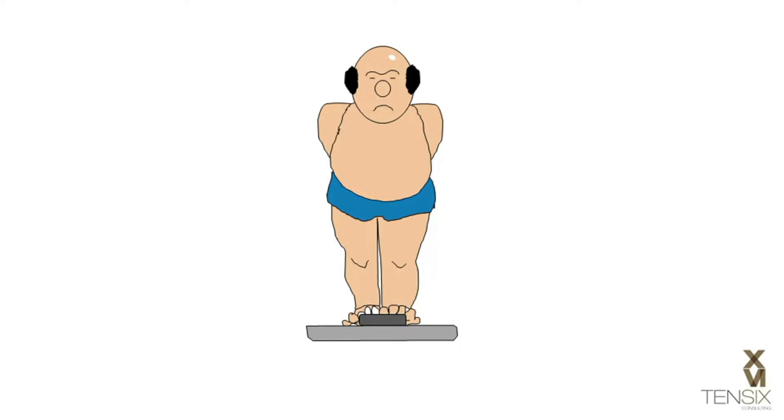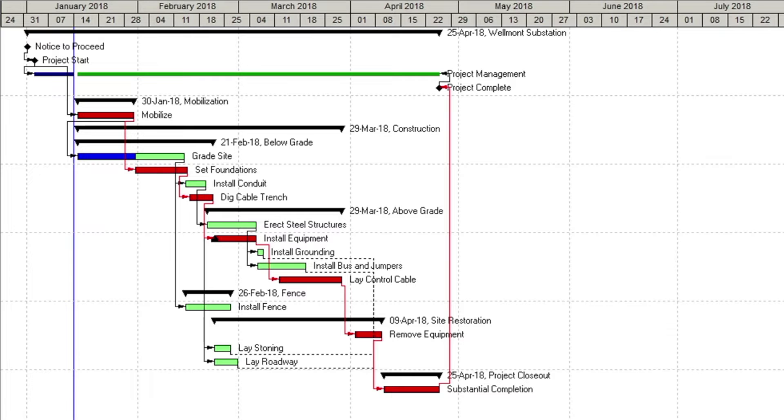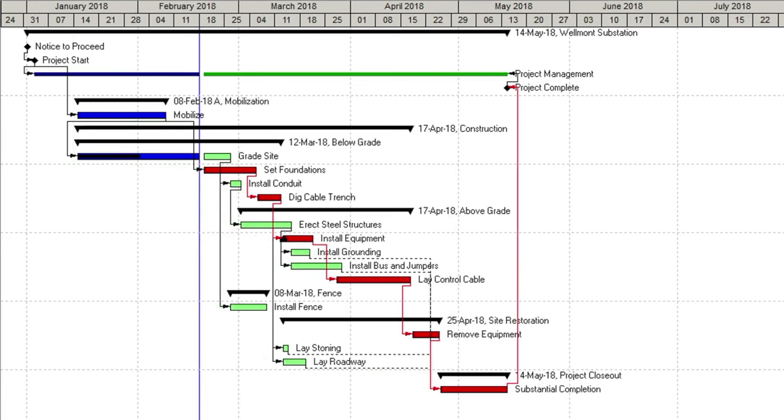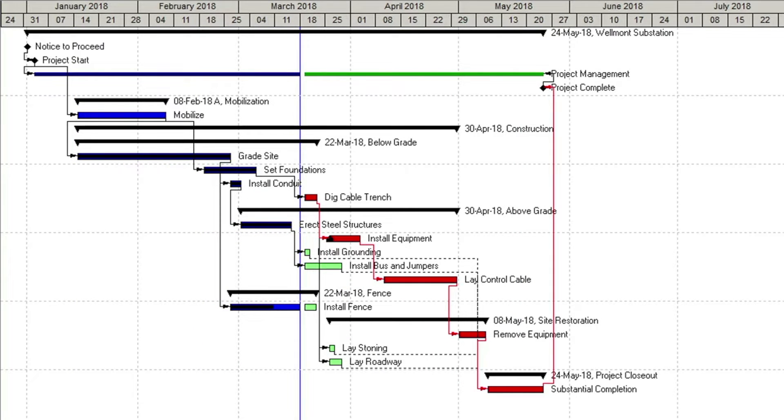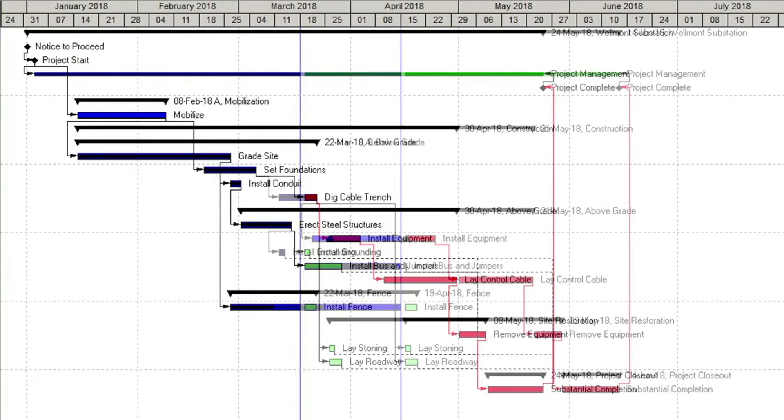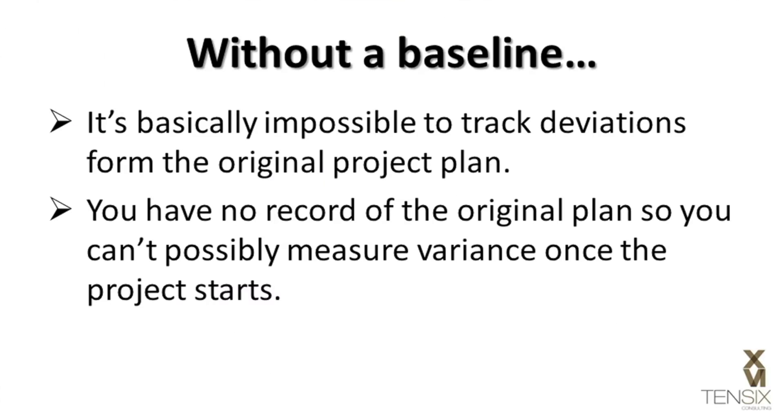The same is true for a schedule. Without a record of the original plan, you cannot possibly measure the variance from the plan once work starts. And because you have logical relationships maintaining the precedence network, changes in the actual execution of the work change the forecast dates throughout the remaining schedule.